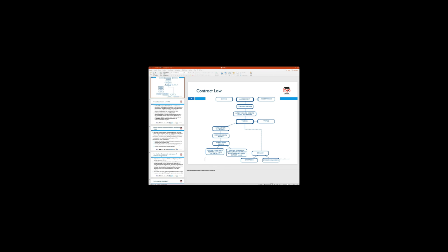And in the contract somewhere it has been written that if the material supply is interrupted or not provided, or if they have not been able to provide and maintain that supply on time, other than by an act of God, then the construction company or the developer can claim damages by suing the party or taking the supplier to court.